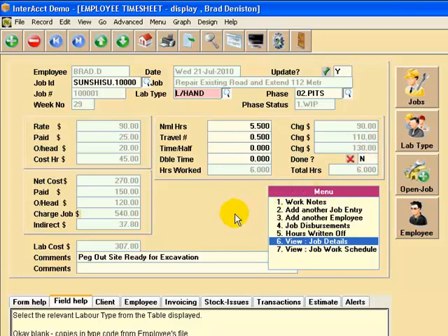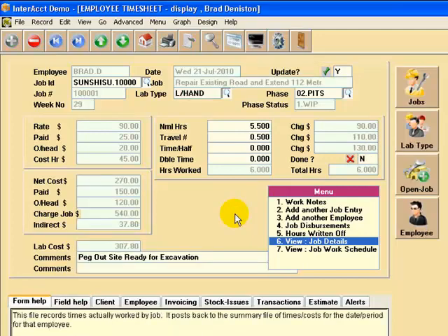What's actually happened too, is that the system calculates different labour charge rates, so you can have what we call contract rates set up for this particular job. So you might say a leading hand is a contract rate that's different to the normal charge rate for an employee, or again those contract rates could relate to a client, so that all jobs that you do for a particular client for a certain class of employee is at a certain agreed charge rate. So there's quite a lot of behind the scenes work to work out what we should charge this job out at.